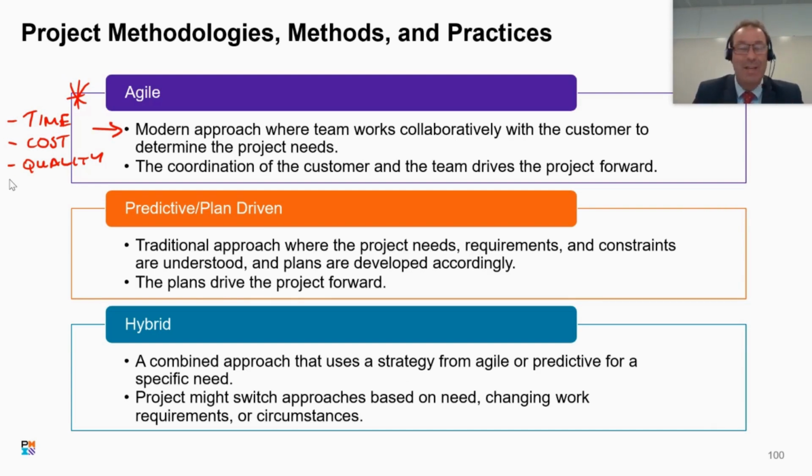And some of the core things about waterfall is we can have tolerances. We can ask for more time. We can ask for more money in order to achieve the list of preferences which are in the project plan. Okay, so how do we do that in Agile? Because things must go wrong in Agile environments. No, of course they do. But what we do instead of asking for more time or more money, we drop the lesser important features.